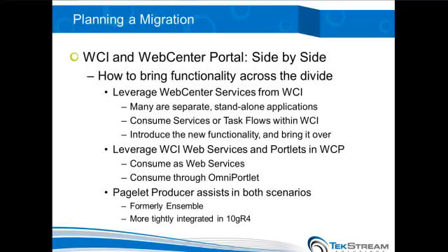That's something that you can do that you can immediately pull forward. So to your end users, the users who are actually logging into your system, what are some of the ways that you can introduce that functionality a little bit at a time, maybe get some of those benefits served up a little bit up front before the big massive migration, so you don't have people thinking, well, what are you doing for the next however many months? Maybe I can just put something out there and get it exposed a little bit sooner.